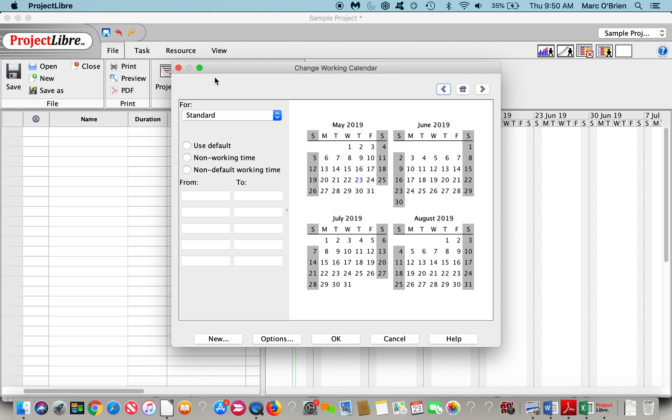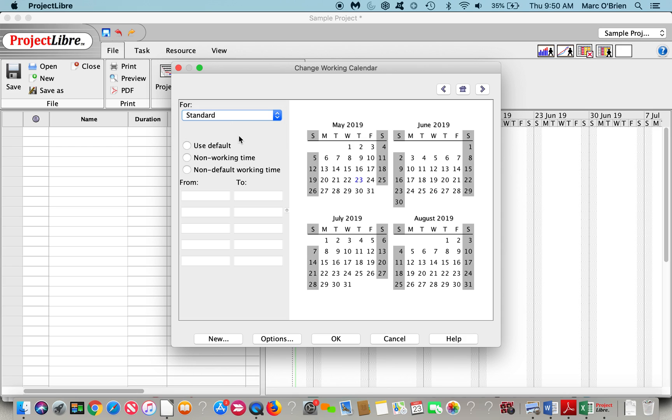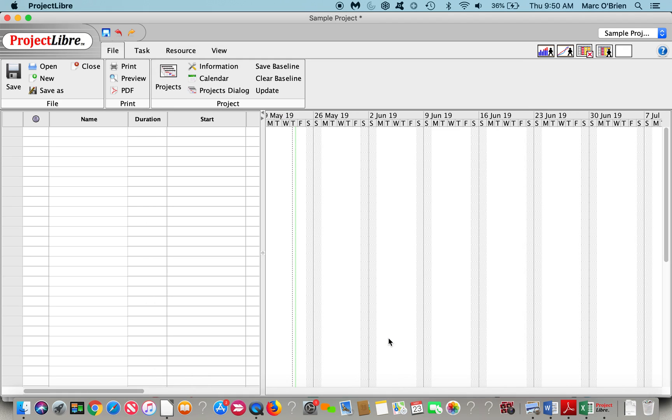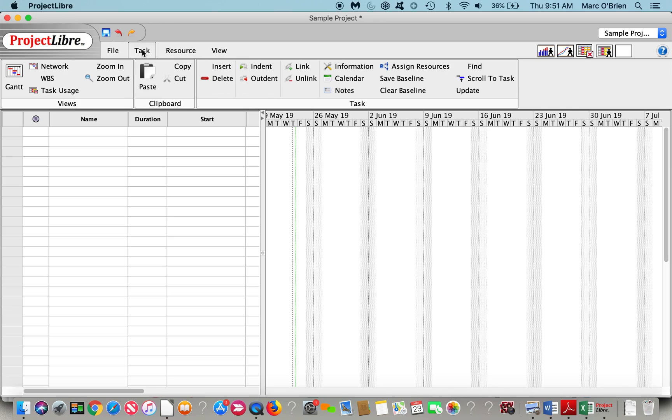For Calendars, you can give them calendars, 24-hour shift, night shift, specific calendars. If I don't want working time, I could highlight Mondays, and no one likes to work Mondays anyway. You can apply the calendars to projects, tasks, resources, etc. And there are baselines.